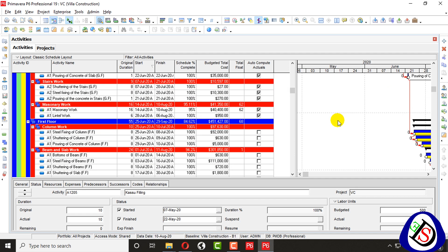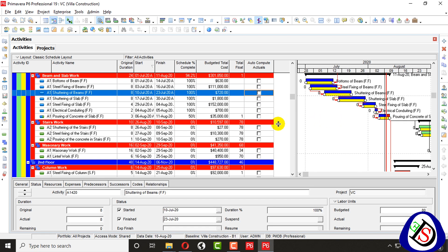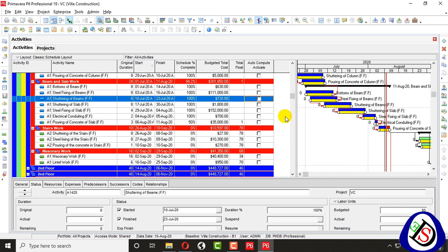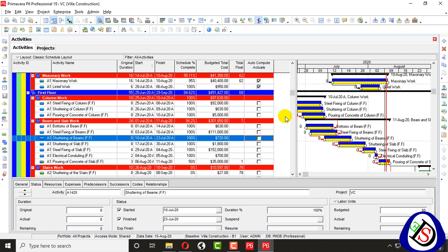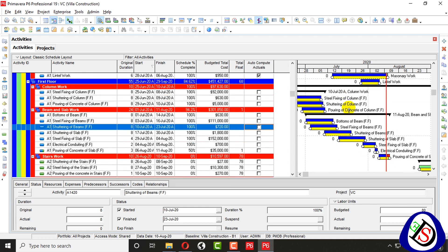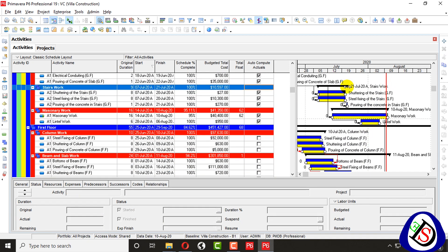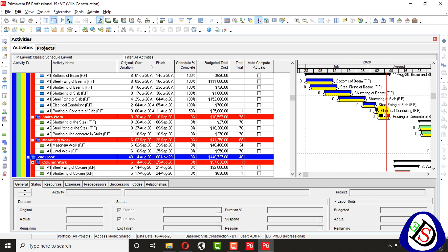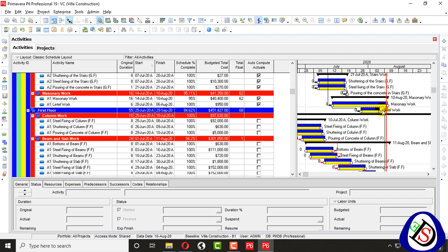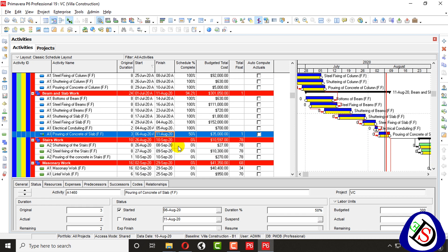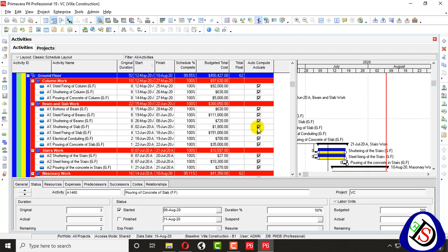When I click the date, it automatically updated the activities up to 10th of August. The activities before the 10th of August are completed automatically. You can see from here up to 10th of August all activities are completed. The 11th of August activity has started but is not yet complete.